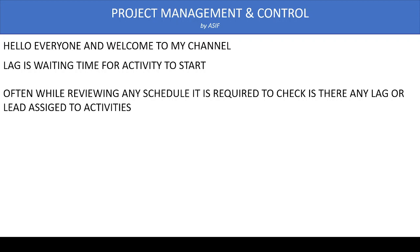This means our project can be finished earlier if we remove this lag. That is why it is not recommended to use lag time in activities. Another reason is that lag and lead cannot be shown in the Gantt chart itself.